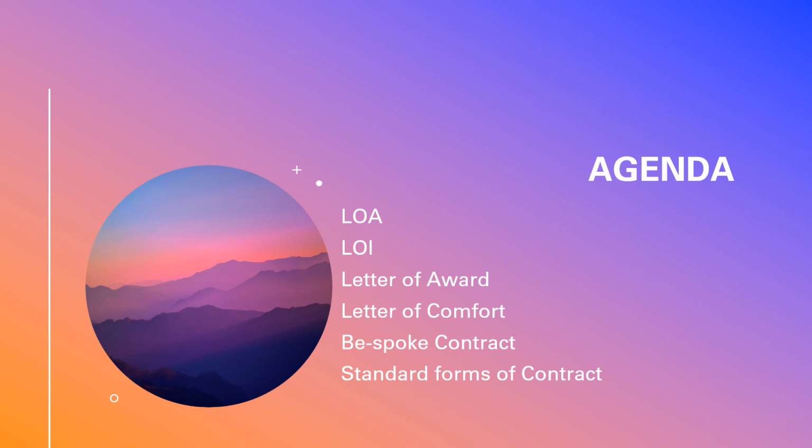You change the payment term now, so the standard form of contract is modified. Definitely, if a contractor looks into it, only after 80 days will he get the payment. So he has to fund, or he has to pay his employees, for these 80 days without payment. So he is going to load this risk into your contract, and there is a chance you may get highly inflated bids.